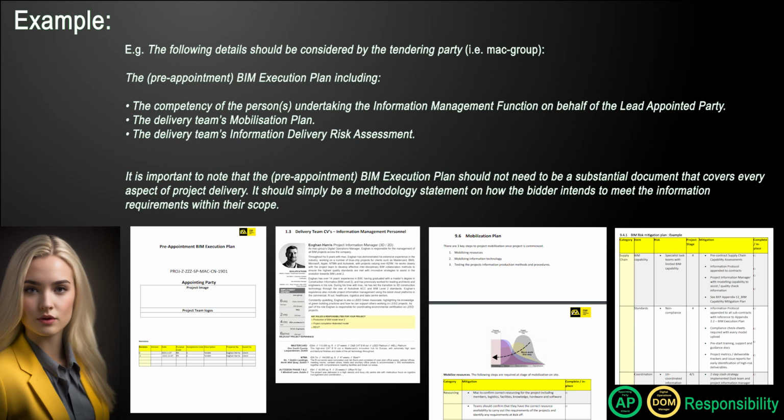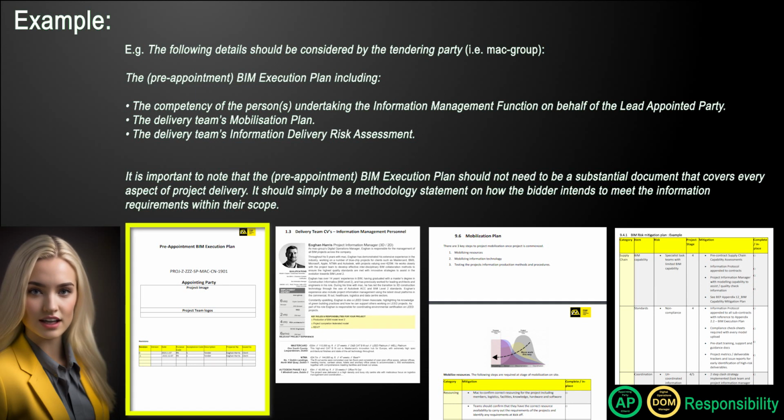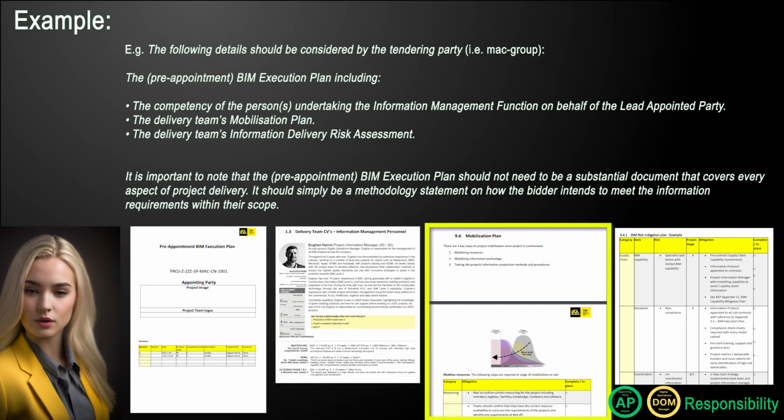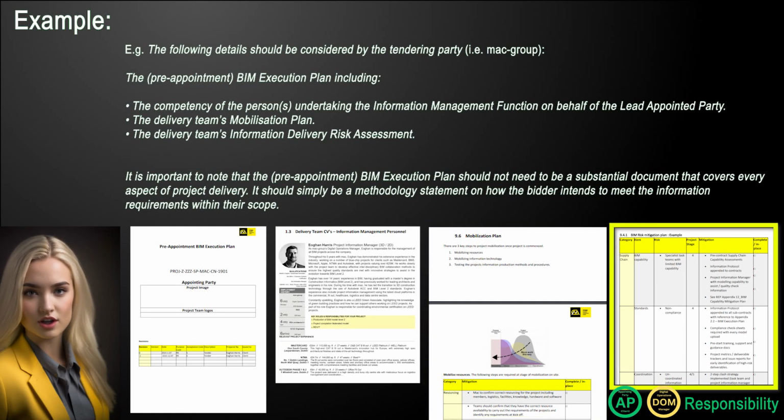by MAC Group: the pre-appointment BIM execution plan including the competency of the person undertaking the information management function on behalf of the lead-appointed party, the delivery team's mobilization plan, and the delivery team's information delivery risk assessment.